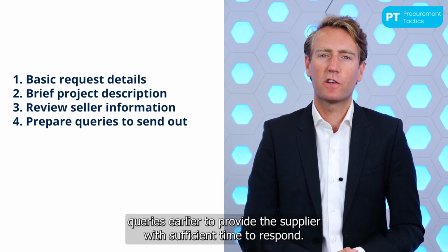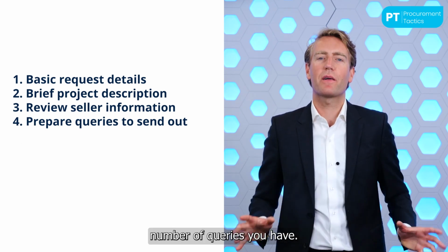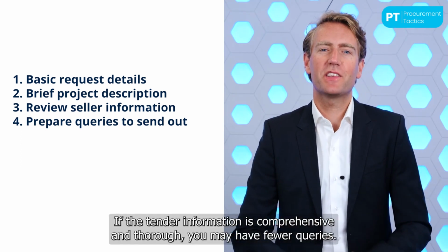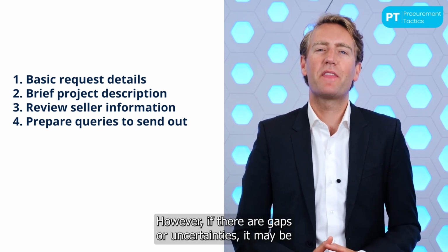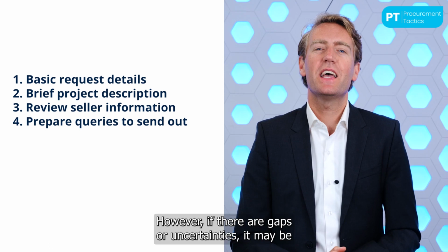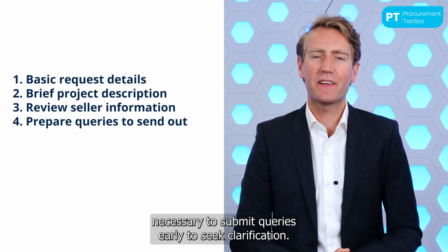Assess the completeness of the tender information and the number of queries you have. If the tender information is comprehensive and thorough, you may have fewer queries. However, if there are gaps or uncertainties, it may be necessary to submit queries early to seek clarification.